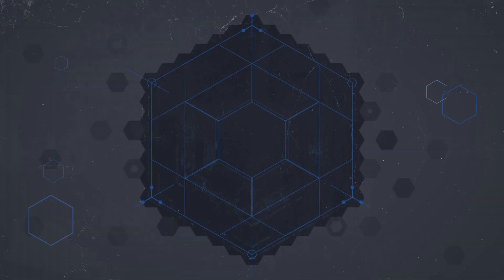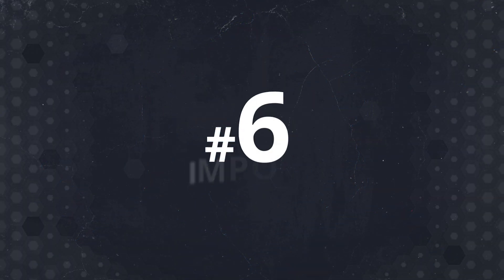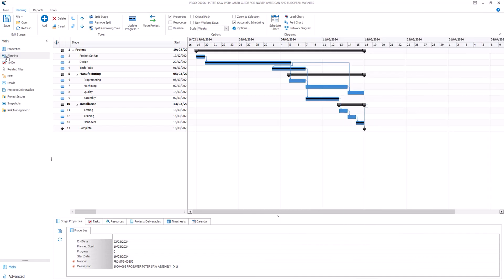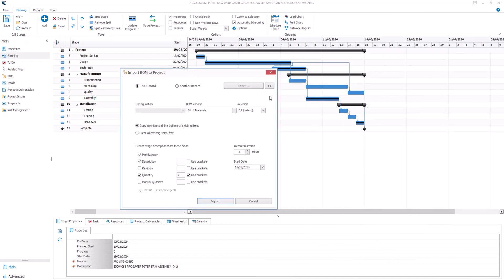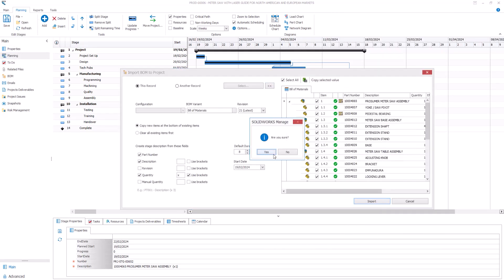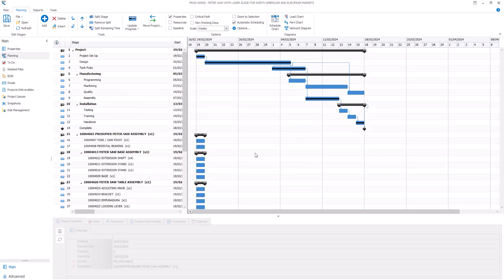With SOLIDWORKS MANAGE 2025, you can now import a BOM to quickly generate a product timeline. Each part in the BOM becomes a project stage, helping you to set up complex manufacturing timelines faster than ever.